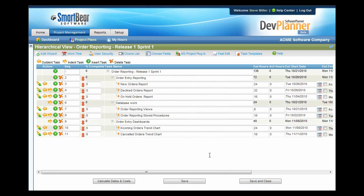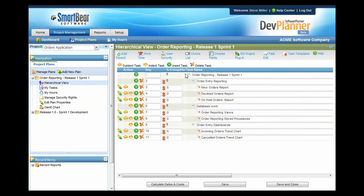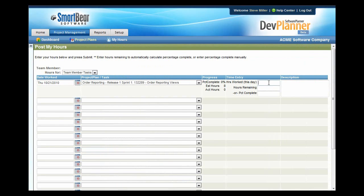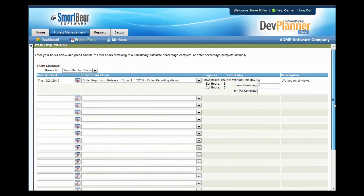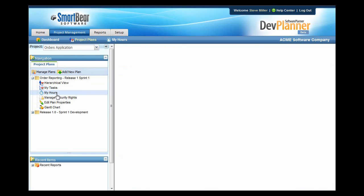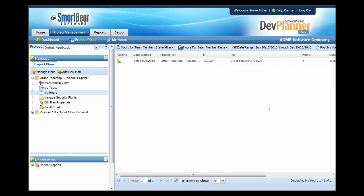We've shown you the Project Manager or Scrum Master view where you can manage all project plan deliverables. But how does the end user — the engineer who just needs to log time and review their hours — use it? When they log in, rather than seeing the hierarchical plan, they'll simply see their task list. They can add time at the end of the day by finding a task, pressing the hourglass, which takes them into hours entry mode. They can then enter how many hours they worked and how many hours are remaining, add notes about what they worked on, and press Submit to save. They can then see all time entries in their hours area.